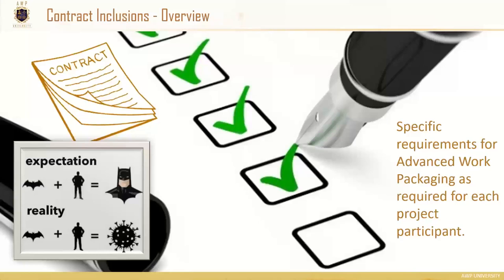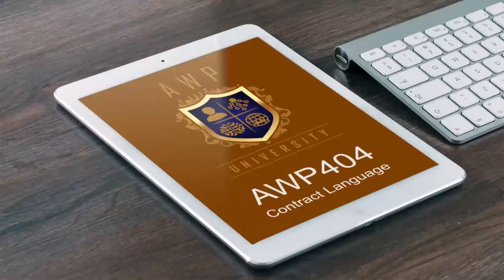When I say requirements, I mean not just the planning activities, but also data requirements. Through the technology discussions yesterday, there were great discussions about data requirements and how data needs to be transferred. The new data requirements developed within CII are literally just about a contract inclusion in themselves. Make sure your contracts are not just written from a 'thou shalt' point of view, but specify how you need to deliver information. AWP 404 within the university is a great course on contract language.